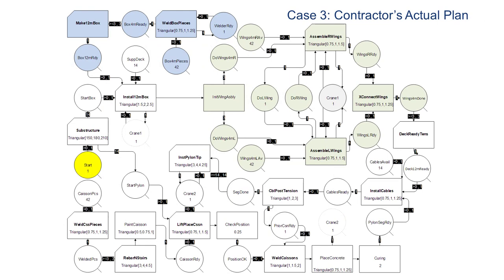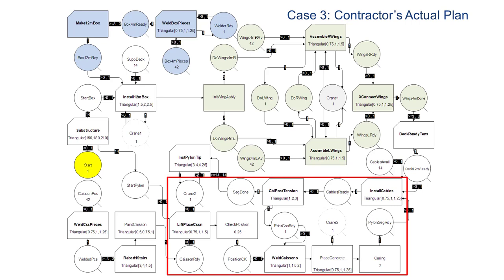The Easy Strobe model for Case 3 shows the actual construction plan followed by the contractors. The construction of the deck is similar to Case 2, but the pylon uses prefabricated steel caissons instead of sliding formwork. The Easy Strobe model corrects the corresponding Cyclone model in two important ways. The major mistake in the Cyclone model for Case 3 is that it allows the crane to start lifting all 14 steel caissons sequentially without prerequisite conditions, allowing them to float unsupported in the air while waiting to be welded. The second mistake was that the crane does not support each caisson while it is being positioned and welded to the previous one. These mistakes were corrected in the Easy Strobe model by adding several new queues and links.